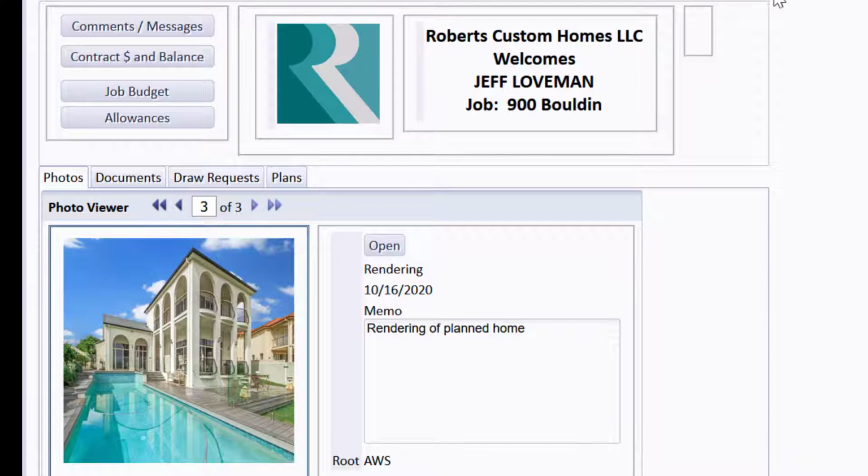customer, you will probably have other buttons that they're seeing of things like change orders, that kind of thing that they can approve, and various other things depending on the type of contract it is. If it's a cost plus builder fee or markup, you might be showing them the actual costs with actual attachments that are copies of all their invoices that are entered when the bookkeeper is entering the bills, the job cost bills, which is really great because then you don't have to copy all the invoices for those cost plus customers. They can come here and see them.